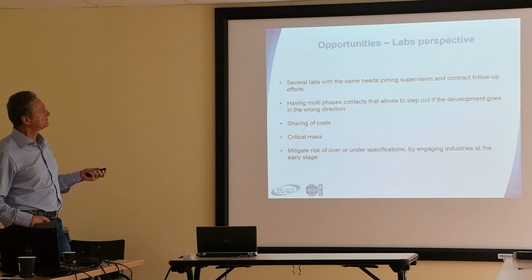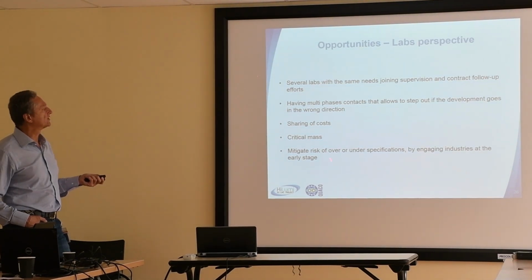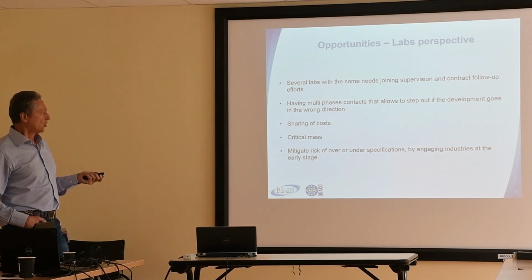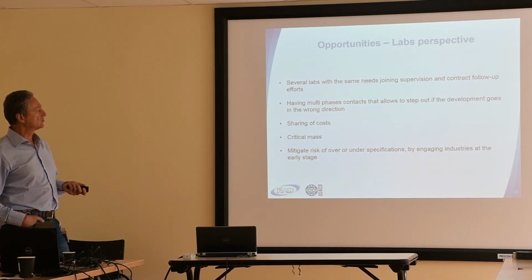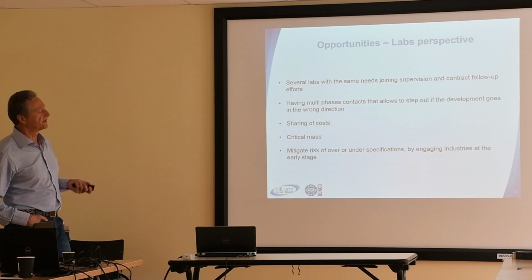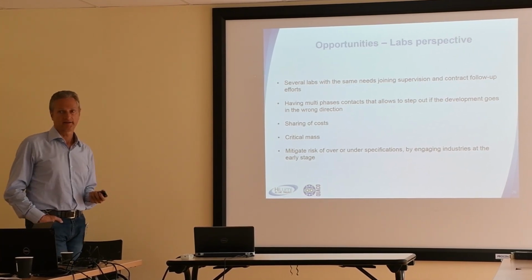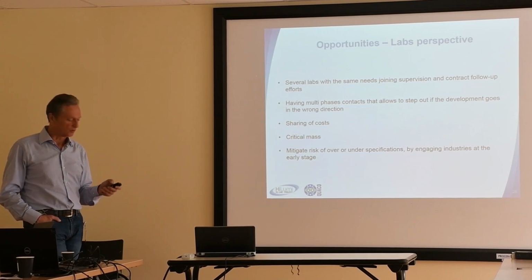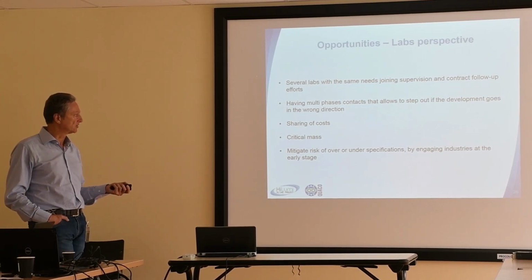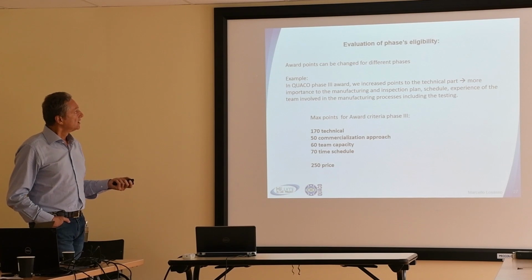So you have sharing of cost, you have a critical mass, you have mitigation of risk, of over and under specification, because you engage industry at the early stage, and so the industry will know and will give you feedback about the kind of specification that you are producing.